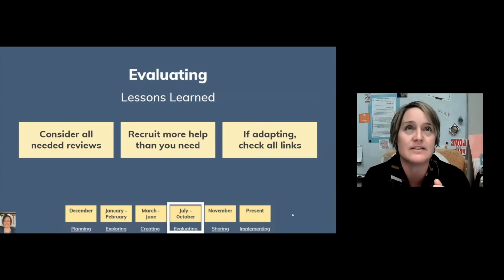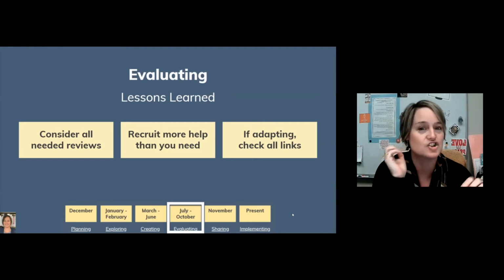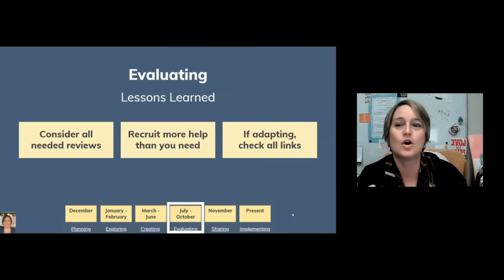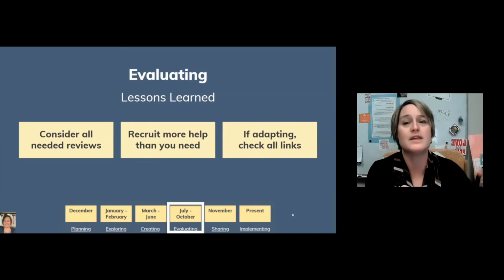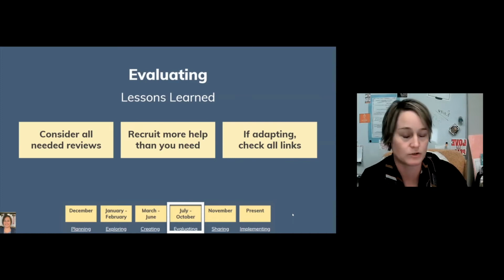And so the mistake that I made in the original planning of the timeline is that I didn't consider all of the different reviews that were going to be needed on the work. The content needs to be final in order to have somebody surface edit. I mean, why have somebody waste their time scrutinizing every word if a content reviewer might suggest that you totally redo that whole paragraph? So it seemed to us like it would make sense to have the content where we wanted it first, and then send it off to the reviewer or to the copy editor. And then, of course, the accessibility review should be the very last thing that you do. And I didn't consider all of those at the very beginning.